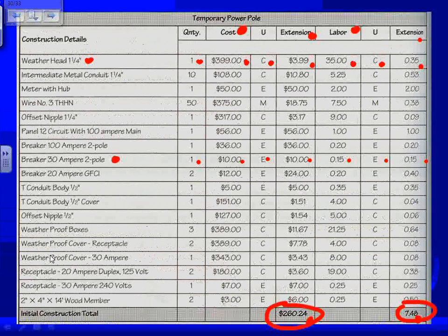Which one are you looking at? Okay, I have hop number 3. They're assigning 50 feet on average. Yeah, 50 feet average. Now, if you have 100 feet, you're going to eat that price, basically. And 50 feet is not too bad. I mean, most of the time, the power is going to be somewhere in this area. Now, if your experience says you need 70 feet, that's where you put the 70 feet, or 100 feet.